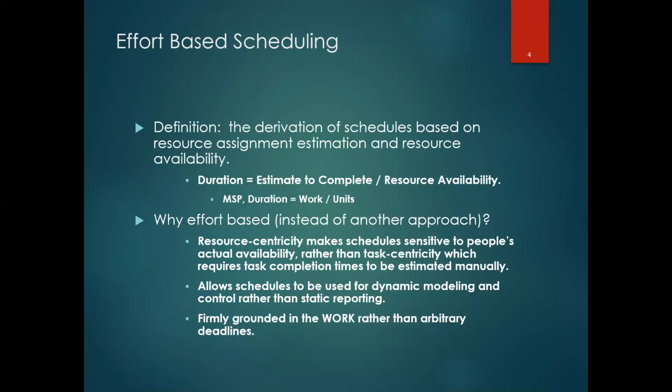Within Microsoft Project, it's very, very similar conceptually. Duration is work divided by units. I'll get into this a little bit later, but work in this concept does not mean estimate to complete. Work within the construct of Microsoft is remaining work, which would be the equivalent of estimate to complete plus actual work. So it looks at the whole breadth, and then units, if you're familiar with Microsoft Project, is that particular resource, what they're available to that particular task at that time.